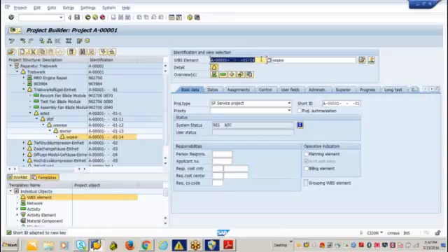But the total code length should not go beyond 26. So first you need to understand what their current business process is. How many levels of WBS elements are required? Suppose they have 7 levels of WBS elements. In that case, please make sure that the project length is as simple as possible, like 1 or 2 letters, not more than that, so that you can accommodate more levels of WBS element